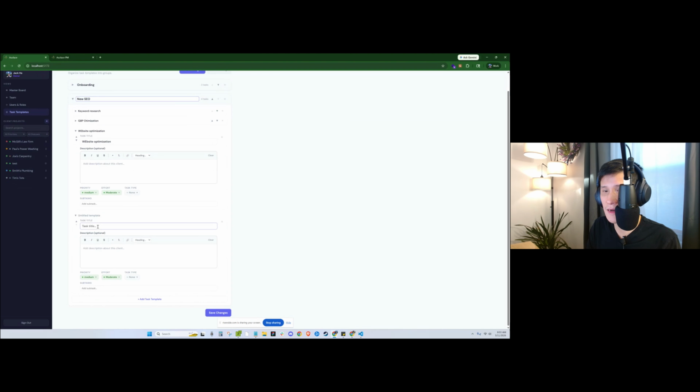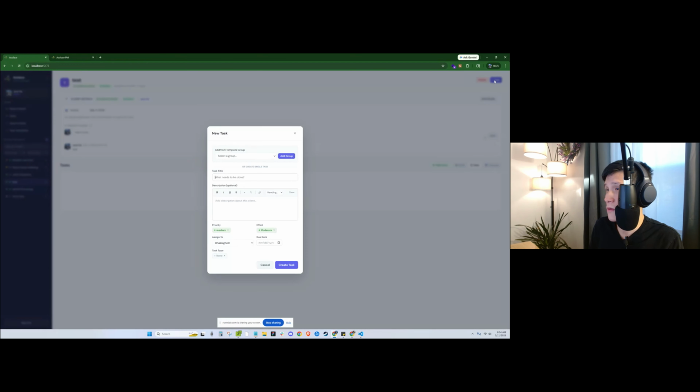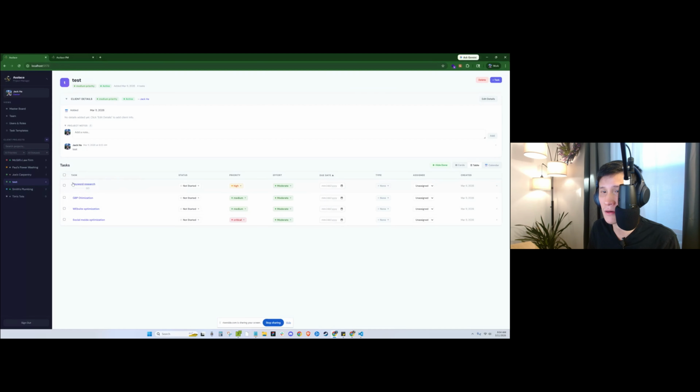Let's say social media optimization, right? And then you save it. Make this critical. Save it. So you have your SEO template here, and then you go into test. When you're adding a task, you can select a group of template tasks, and then you can add the SEO, and then you add the group, and bammo, you have all your tasks automatically added here.